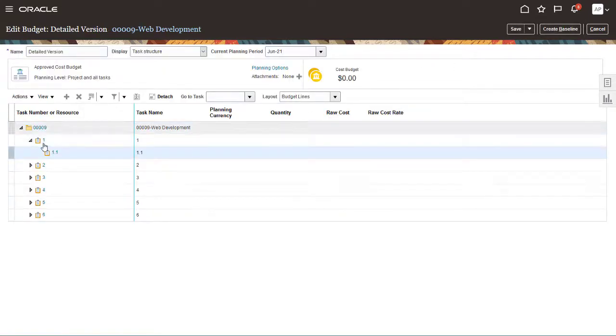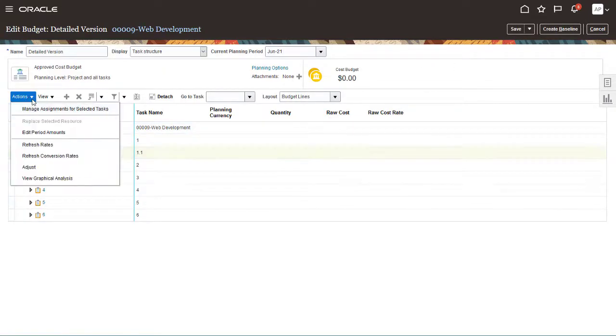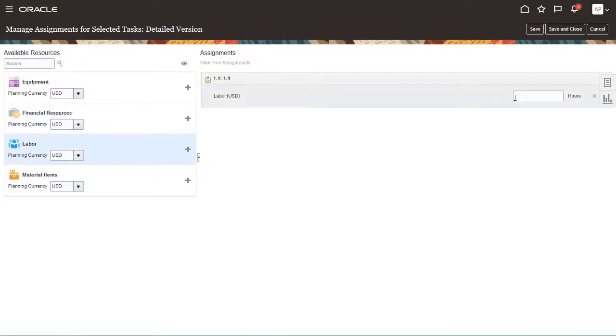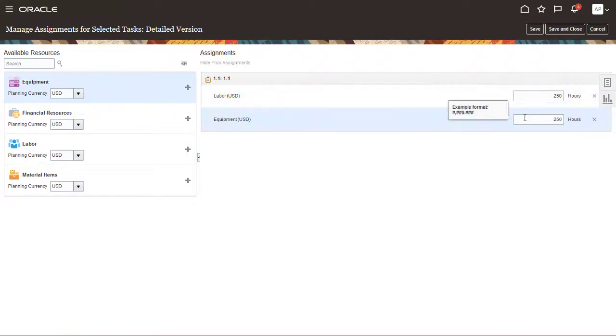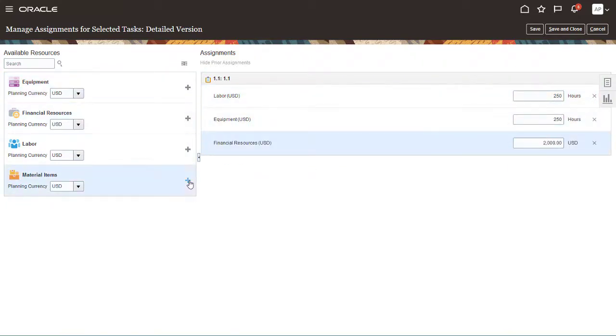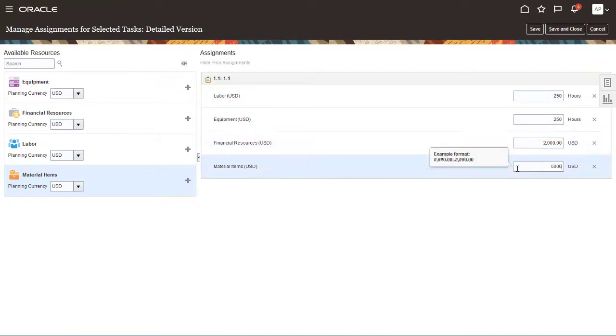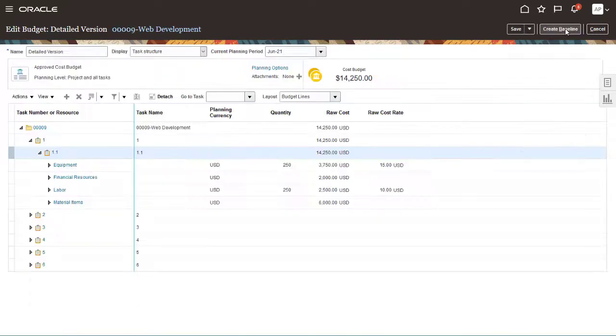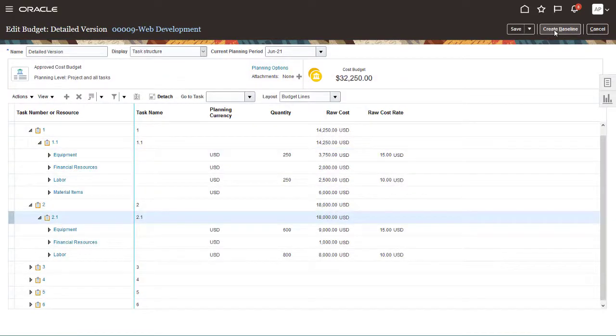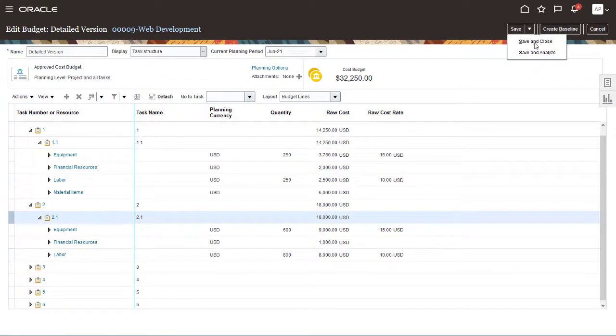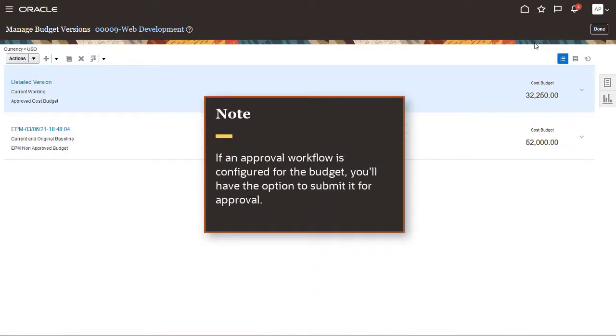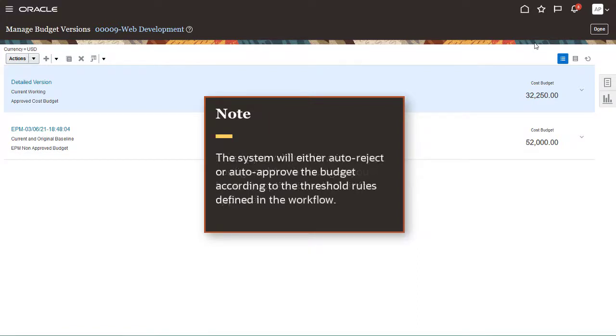I'll create a detailed budget using the strategic budget from EPM Planning as a reference. I'll enter detail line items for the budget. When you're done, save the budget. If an approval workflow is configured for the budget, you'll have the option to submit it for approval. The system will either auto-reject or auto-approve the budget according to the threshold rules defined in the workflow.